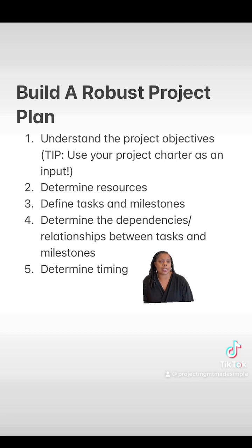Let's take a real world example to illustrate how to build out a project plan. Let's say, for instance, I'm building out the first version of TikTok. And so I want to have an understanding of what are the goals with TikTok? What ultimately does the sponsor or sponsors want to ensure happens as a part of this? Is it more important that we keep on track with the schedule and we get to market sooner? Is it more important that we have enough features that they see as valuable? What is going to be the priority? Because that's going to drive what our project plan looks like.